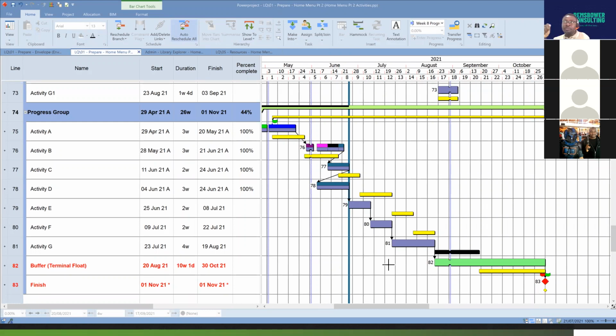So sometimes fast progress may look like fast, but the time you gain is often lost because certain project constraints have been agreed with your supply chain partners way ahead of time. That makes it not easy for them to make changes to that schedule anymore.